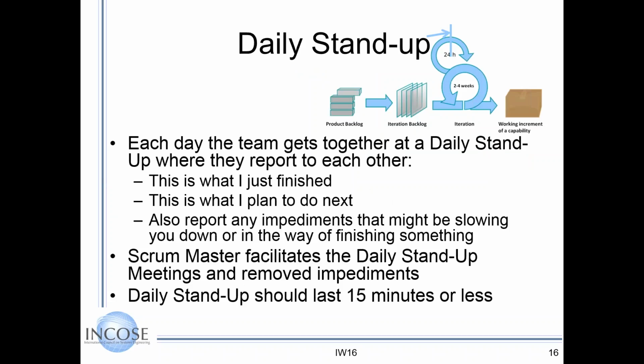So the daily stand-up is a ceremony in Agile practice where the team gets together and says, this is what I just finished, this is what I'm going to do. Oh, by the way, I can't finish what I'm working on, I've got an impediment that could be slowing you down or is in the way of finishing. The Scrum Master of the team facilitates the daily stand-up to remove impediments. The product owner also might be needed, and it should last 15 minutes or less.